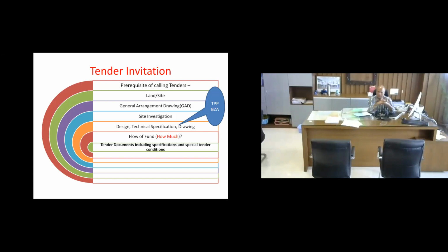Then I got a call from my member in the Board that I have to decide this and invite tender without any delay. Then I raised my hand saying that unless I do my technical part of it, I cannot ask my divisional team to go ahead with tender, because we do not know what we want out of tender. So one has to devote time and take a stand also, because if I buckle, my divisional team will go for a tender and we do not know what we want out of the tender. This part is very, very important, especially if you are doing work which is not routine work. Even for routine work, one has to prepare.